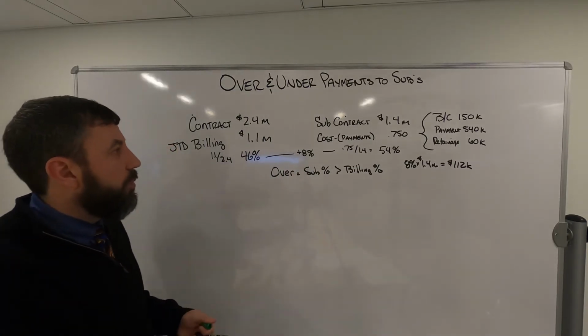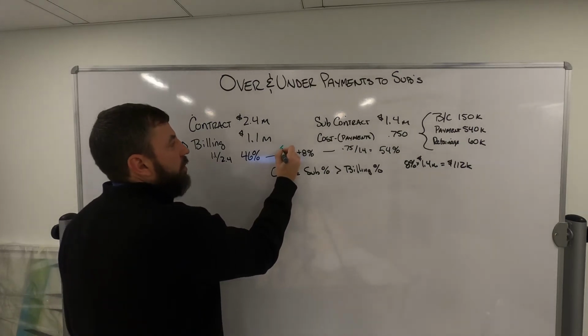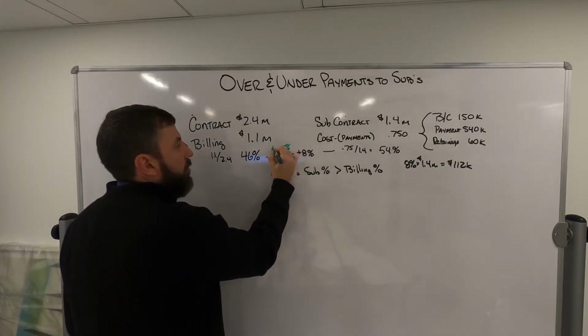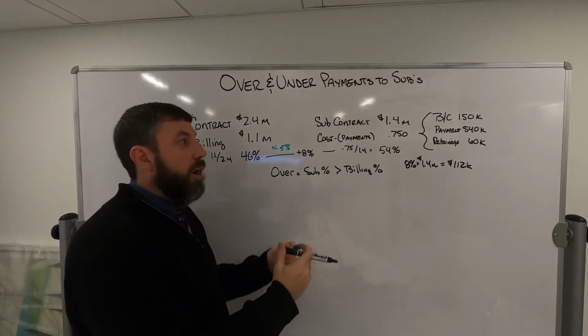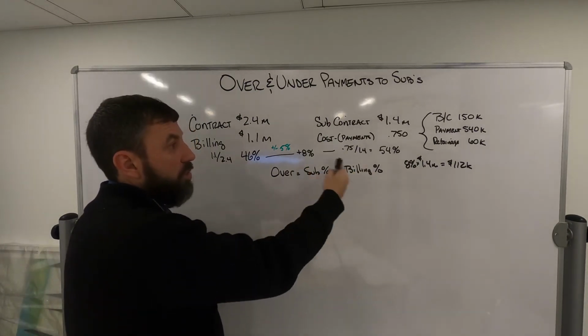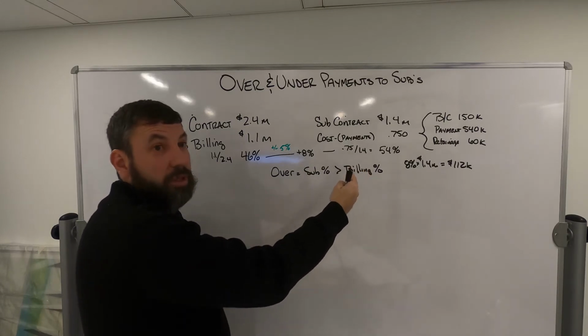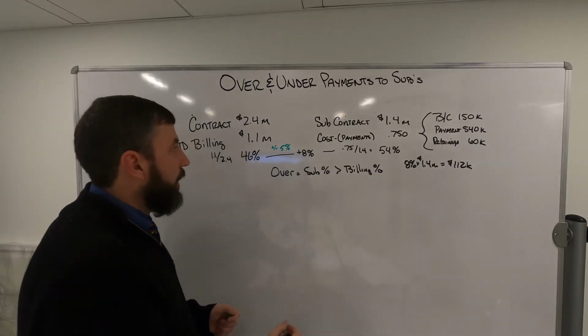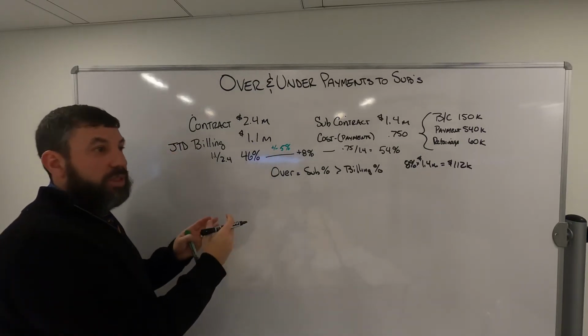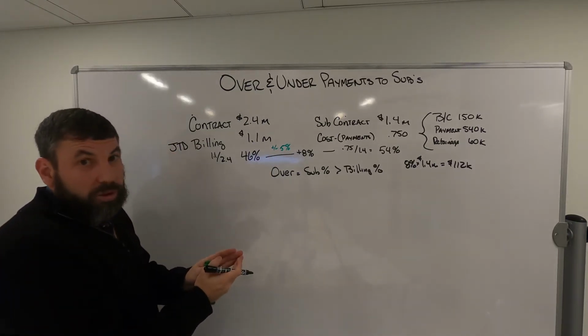Now, the rule of thumb is if anything greater than 5%, plus or minus, you should really be able to understand and be able to explain to someone why we are at that point. So if this was the situation, and you were asking for money, the question would be why? And again, the rule of thumb we're looking at, if it's within 5, it's reasonable, still will be asking the